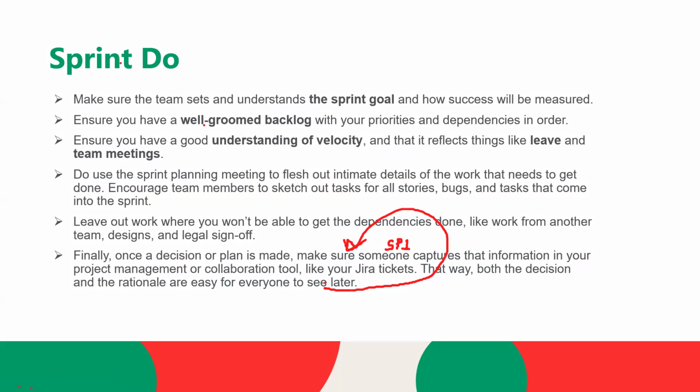Okay, so whenever you are designing any sprint, at the time of sprint planning call, that is the first call of your sprint. Okay, so let's say Monday your sprint is starting, so you will have first call, that is sprint planning call. So in that call, we do decide what will be sprint backlog and who will work on what part. So all those kind of discussion will happen.